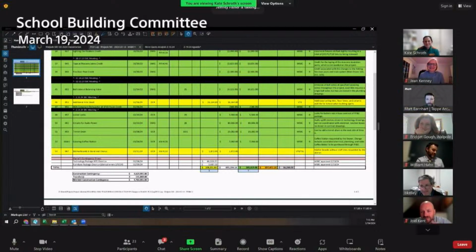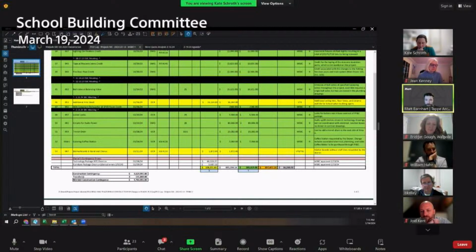And then the trench drain, you said that's for additional drainage? Yeah, that's for additional drainage. That's on the east side of the classroom wing, kind of where the outdoor classroom is, along with the swing set. To the east of that, and then wrapping to the south of the building, is one of the rainwater retention basins. After the district did a walkthrough, they brought up a concern with having that door there and the retention basin being so close. So they asked us to talk with our landscape and civil architect to see what redundancies we could add to the project. With their review, we can add a trench drain in front of that door. So if any water does make its way up, it'll hit that trench drain and not go into the building. Makes sense.